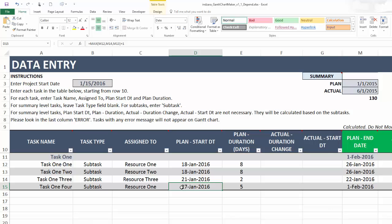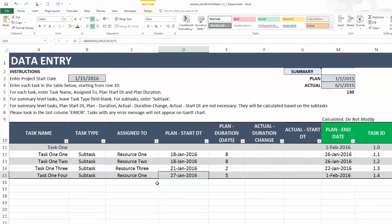This is how you can implement dependencies or predecessors in the Gantt chart template by just typing a simple formula of max and choosing the previous predecessor tasks' end dates. Then whenever those dates change, your start date of the dependent task will also change automatically.